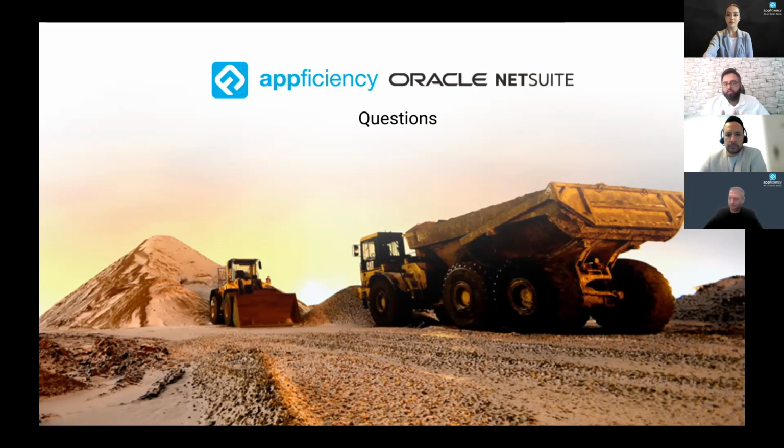And there's also a delay because we're using the cost that is in the system to derive our percent complete. But in reality, the people at the job site have done a better job. So they have actually been able to accomplish more than what we think from a numbers perspective in the system. So that happens quite a lot.